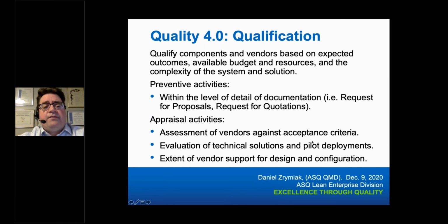The qualification is important, and it incorporates both prevention and appraisal. If you are dealing with a proven performer, a proven solution, in making that selection, you are preventing a series of problems. That's where it's very important to have good qualification, highly detailed RFPs, so that if the partner falls short, you've got something tangible to guide the relationship.